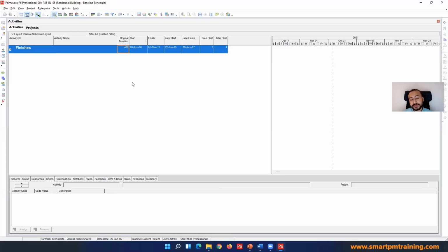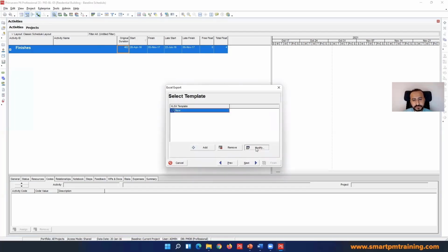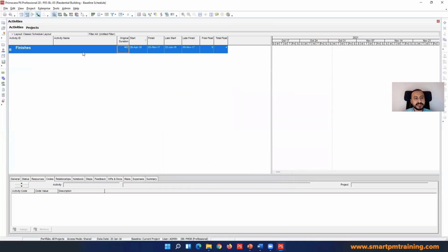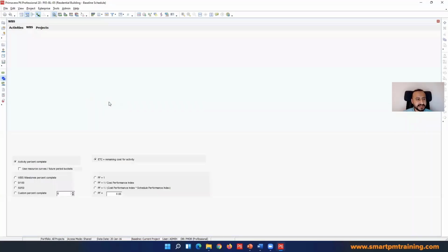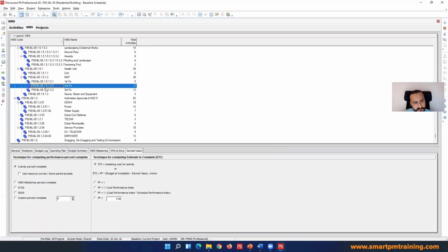What about the export to Excel? I can go to File, go to Excel, okay, and export all activities. You can see only the WBS code, which is worthless. So you're going to have something based on the WBS code. When you export all activities, you will not see that this activity belongs to the plaster family, or that this activity belongs to the block family. You're going to see beside each activity the WBS code here, which is really meaningless. It doesn't help me. So you really want to group activities in a better way.